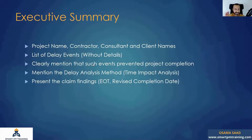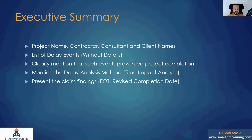The first page of the claim should present the claim findings — EOT, revised completion date. Don't make someone read 300 pages to find out you're asking for three months' extension of time and one million dollars in prolongation costs. Make it clear. Let the reviewer know upfront what you are expecting from the claim, and reference the relevant contract clauses.